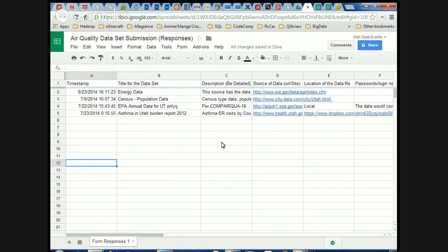And as you start crossing the milestones, there has got to be a check and balance matching what your actual accomplishment is with what that milestone was supposed to be like. And if there is a deviation, you've got to make course corrections as we go all along. This might sound like common sense, but many teams don't do it. For one reason or the other, it doesn't get done.